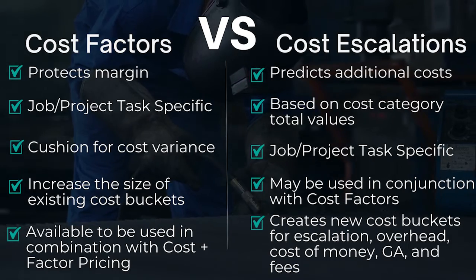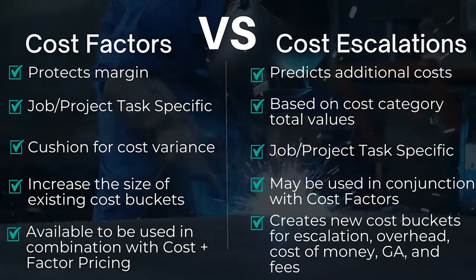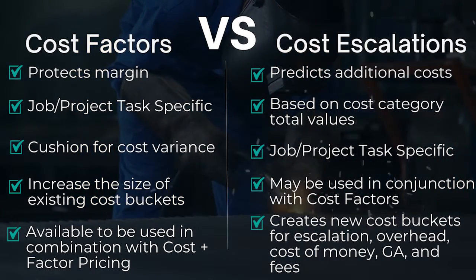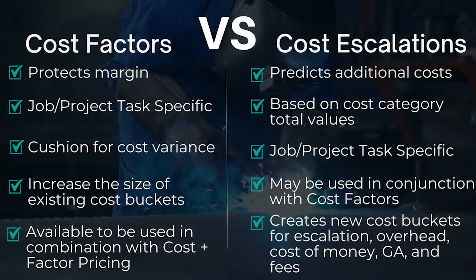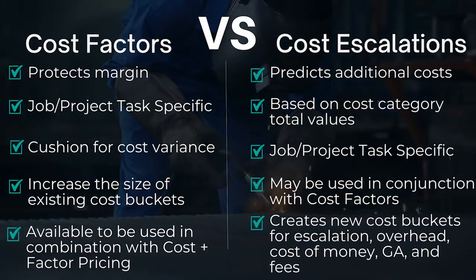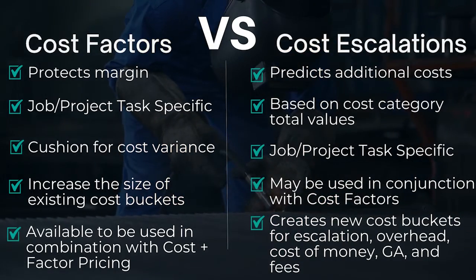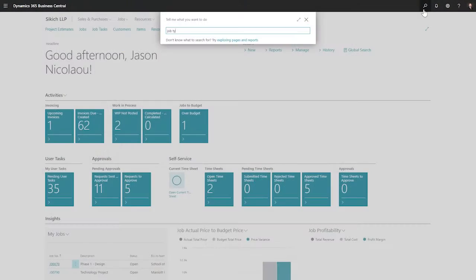Cost-factors are designed to add specific buffers to those tasks that don't always go as planned. Instead of adding margin to the overall project, the variability is captured by task.